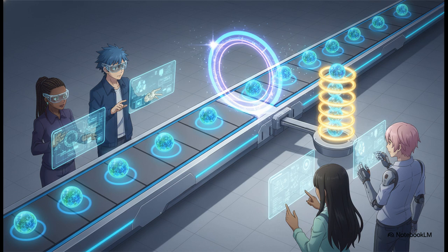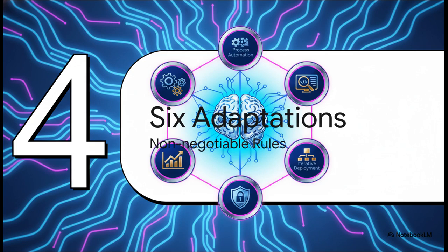You absolutely need rigorous feature flagging. When you abandon time-based sprints and ship continuously, you must have the ability to toggle features on and off dynamically. If a new model update starts behaving erratically in the wild, you need the superpower to instantly flip a switch and turn it off for 90% of your users rather than sitting around waiting for a frantic rollback sprint to happen. Which brings us to Section 4, 6 Essential AI Adaptations.